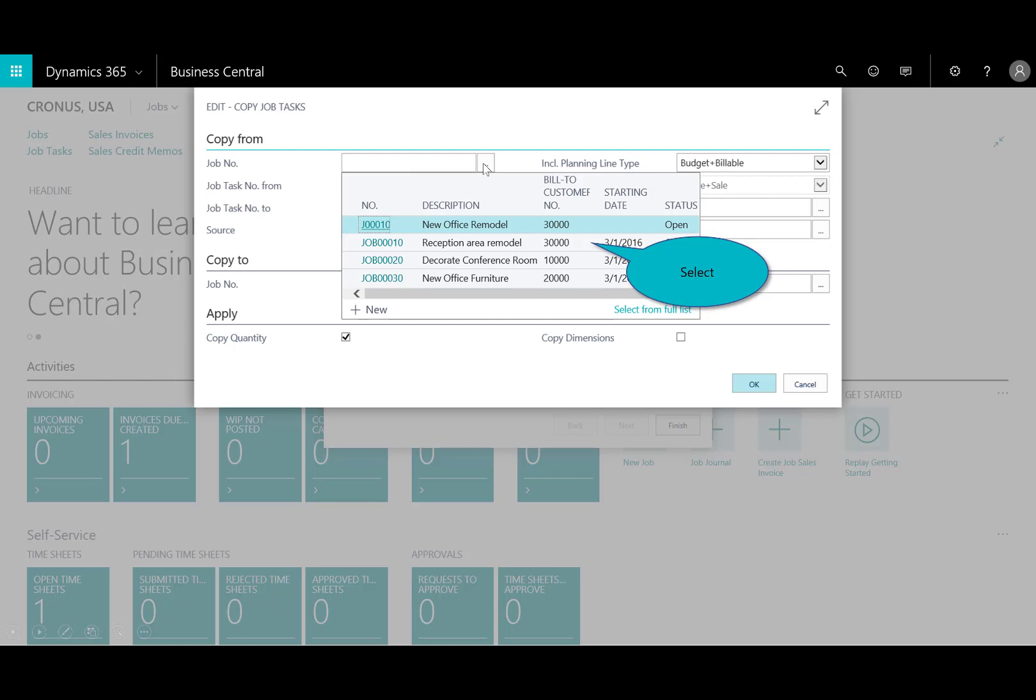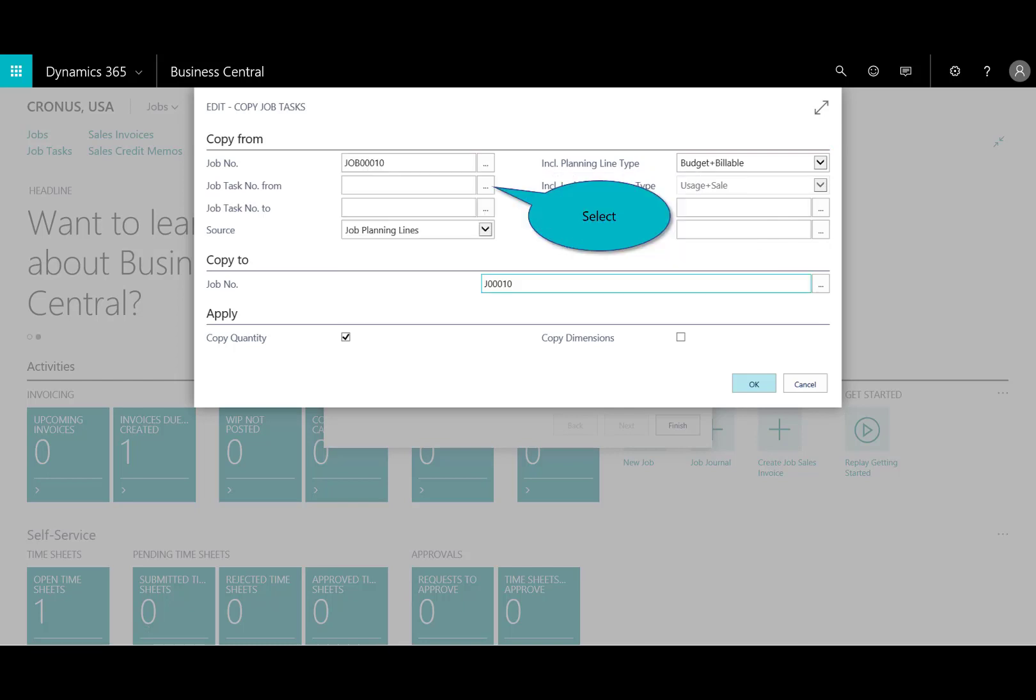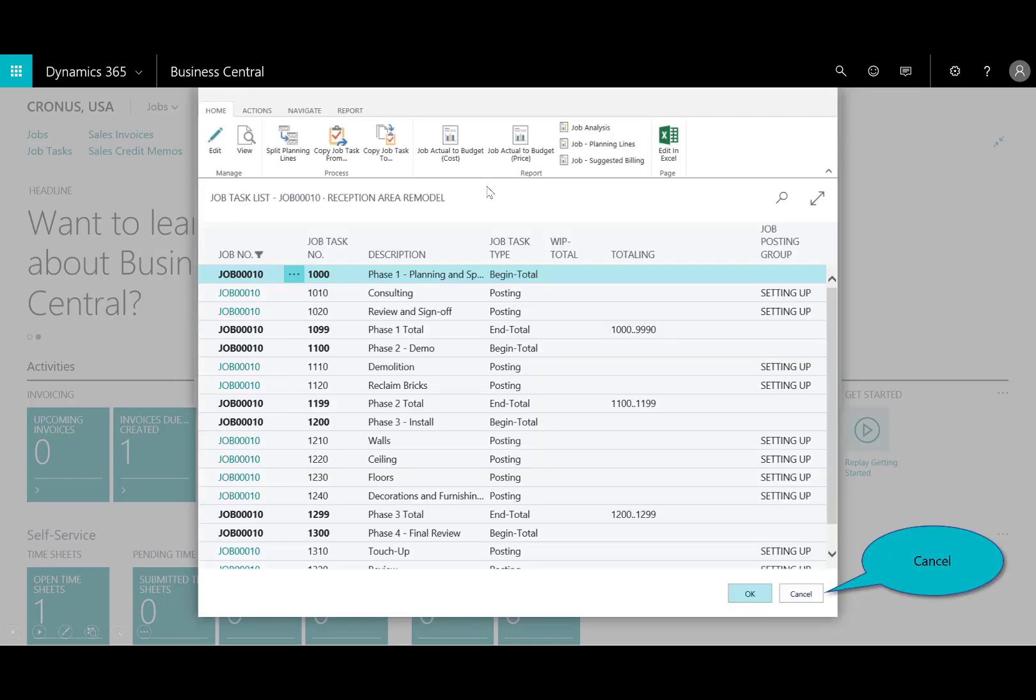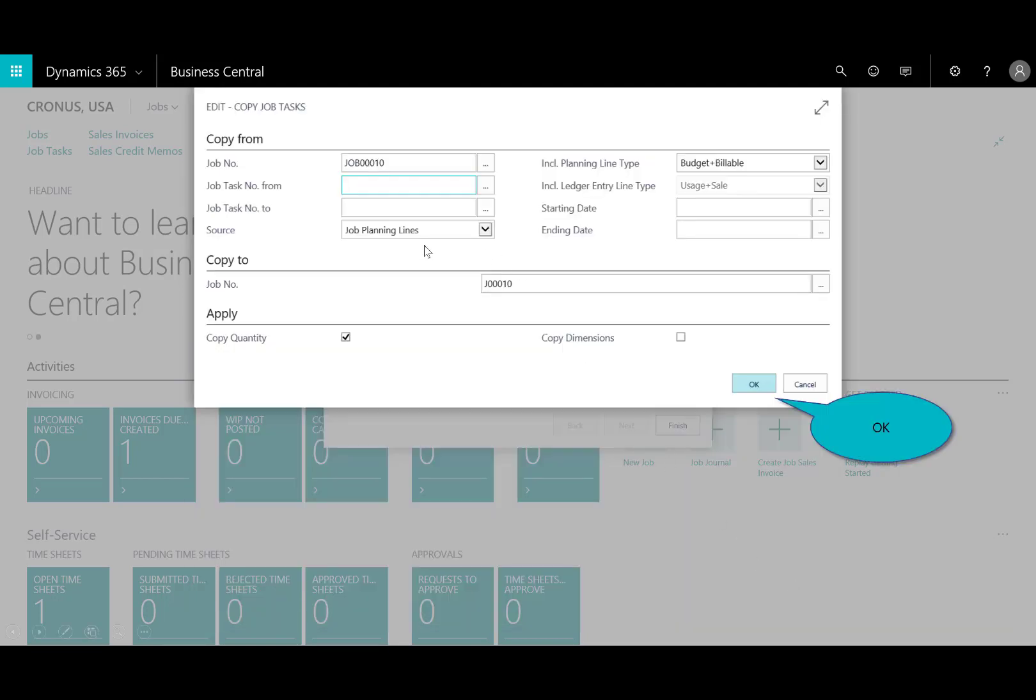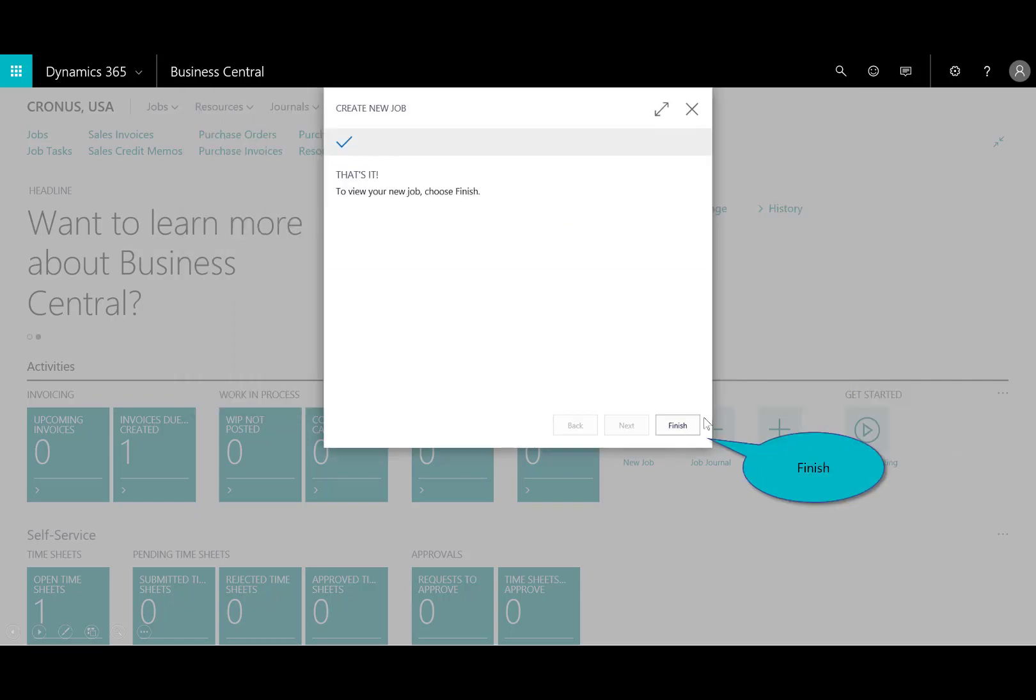So, I, from the ellipsis, can choose and say that this reception area remodel was very similar to the one we're about to undertake. And then you could choose what tasks to associate. So, from the drop-down, I can select individual tasks. I can select a range of tasks. But since the project manager agrees, they're almost exactly the same, we'll cancel and leave that blank. So, there are no job tasks from and to. And then I'll go ahead and copy the quantities, et cetera, and then I'm done.